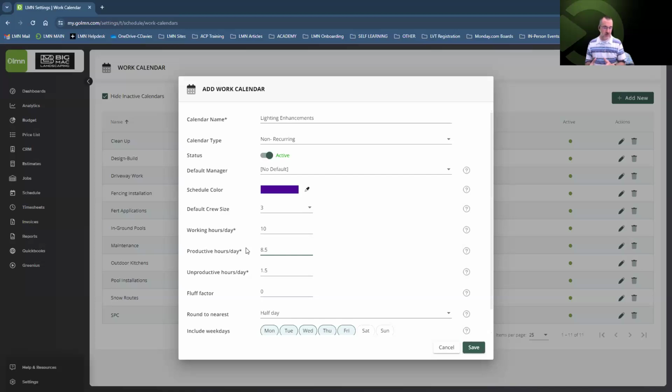So always remember, when you build out your estimate, if you're estimating that you're going to be sending 4 guys for 34 hours, based on this work calendar, this job could get done in 1 day. So keep that in mind when you're looking at scheduling and job creation and estimating moving forward, that we rely solely on man hours of work.